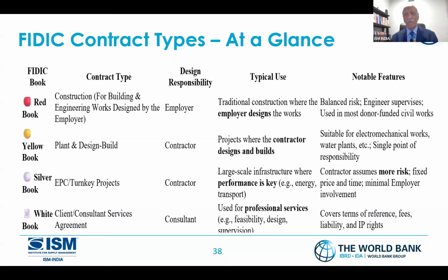Similarly, in the Yellow Book, the contractor designs and builds. But they don't give you a turnkey solution. They just say, okay guys, the building is ready now for the hospitals, for the schools. But then you have to fill it up and make it run.